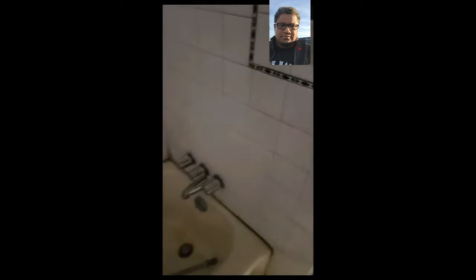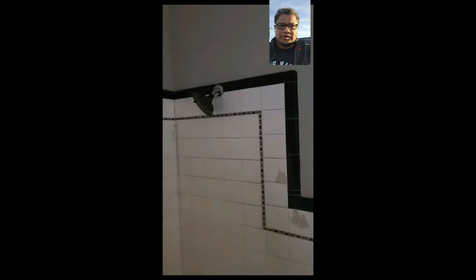The bathroom on the first floor may end up being a full gut. The reason why is that there are multiple cracks in the tile floor. You can't really see it in this video. And the shower head for the bathtub was installed too low, where it only comes up to Jeffrey's chest. So we may find that the effort to save the tile while making the repairs may not be cost effective.